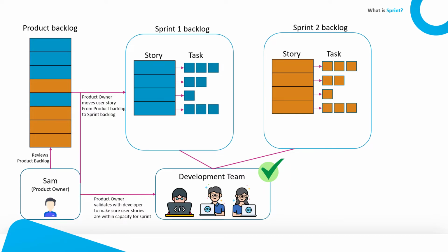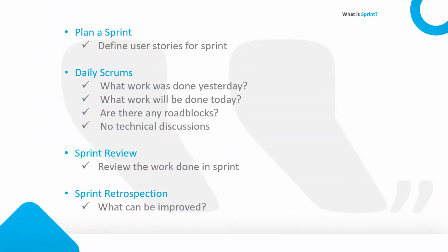So with that sprint planning in place, when the date arrives, the sprint starts, and with that there is the daily meeting that also happens, which is the Scrum meeting. These are the daily meetings which are meant mostly for the development team and the product team. If there are some technical questions, they should be kept out of these meetings and taken offline, since it would be a waste of time to go into technical discussion with everyone on the call.